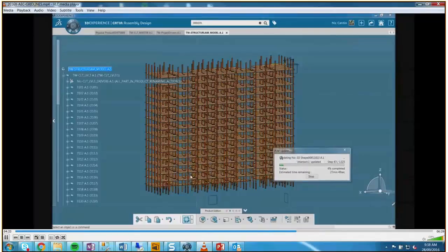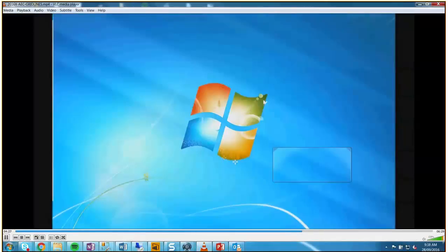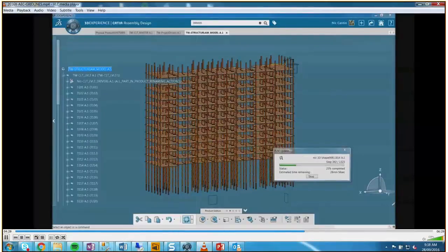Yeah, and it came up in the simulation part too, where we used Delmia to work through the whole installation process, where the whole thing with this project is speed. They didn't want to try to find the most optimal place to rig it every time they got to rig a panel on site. We wanted to give all that information so the panels come off the truck as fast as possible under the crane, and they get thrown into place like a Lego kit.